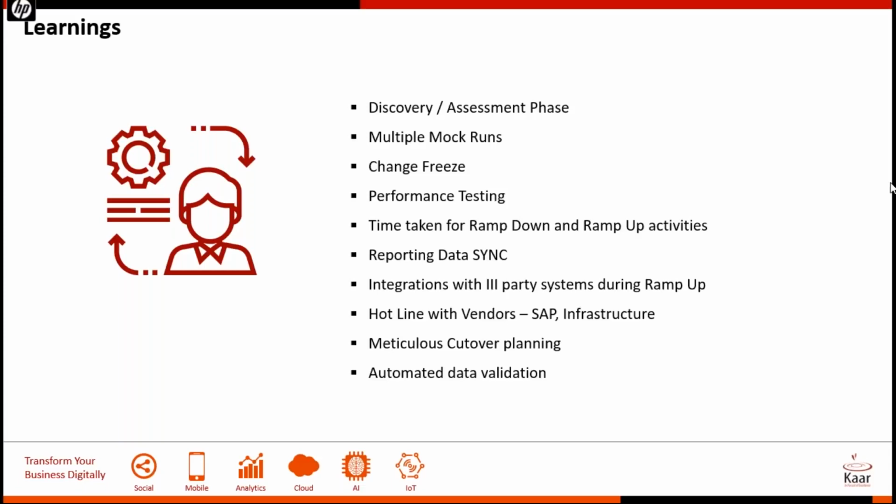Primarily, I would suggest the one-step approach to S4HANA. Reasons being very simple. You can finish off the entire change in one window, and the only change I see from doing it in two steps versus one step is the basis team getting adapted to the HANA database will happen anyway. And if you move from non-HANA to HANA first, you still have to adapt your code to work with HANA, and then you do it one more time and make it work with S4HANA.